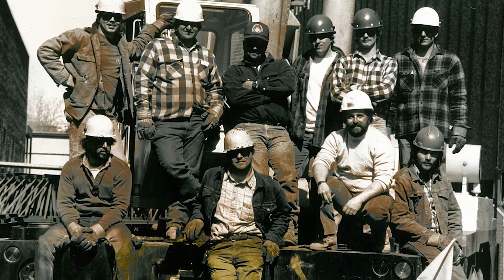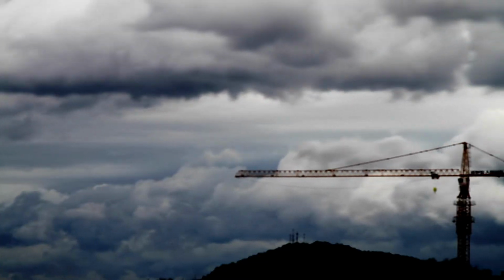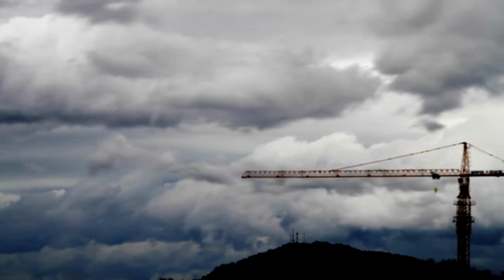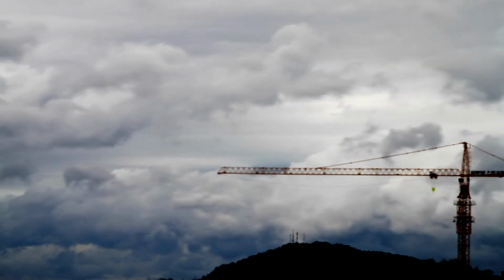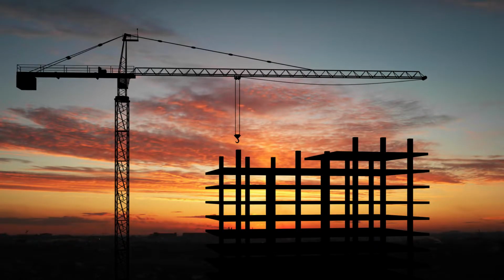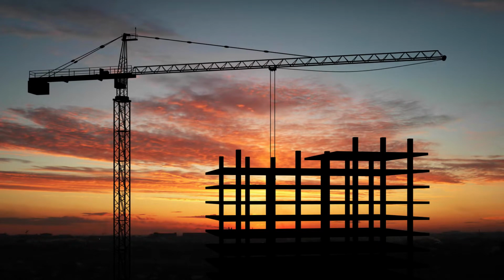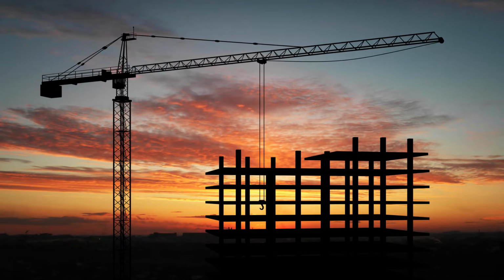This is never a good option for anyone. This leaves an area of the building incomplete, which prevents our trade and every other trade that follows from performing this critical path work. This results in schedule delays, additional costs for work out of sequence, which includes remobilization time, loss of efficiency in moving from one area to another, as well as crane, manpower, and other equipment costs.